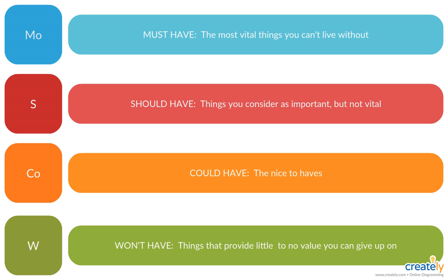And typically a change in one of those areas, and the most typical change is maybe an increase in scope, is going to impact those other areas. It can impact both of those other areas, increasing time and increasing cost. But given the real world and the expectations that customers have, that's just not a realistic way to deal with those kinds of specific changes that occur along the way. In other words, every time we have a change, we don't immediately say that these other things, time and cost, are going to have to change.